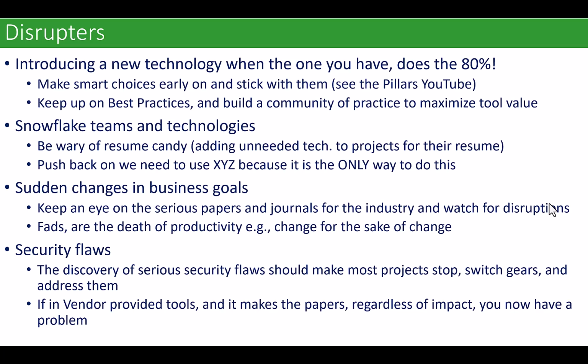They happen. I mean, I'm in the middle of a project and they come to us all and they go, well, we thought we had to deliver this, but we've just been acquired by blah people and they have one of these. So now we need you to do systems integration. Fads, the root of all evil is CIO magazine, in my opinion, but fads occur in technical journals too. And people say, well, we should start doing this thing. And I go, okay, what are the features and benefits and how long is the training and what is the capacity impact? And, if they can't answer those questions, then the answer should be no.